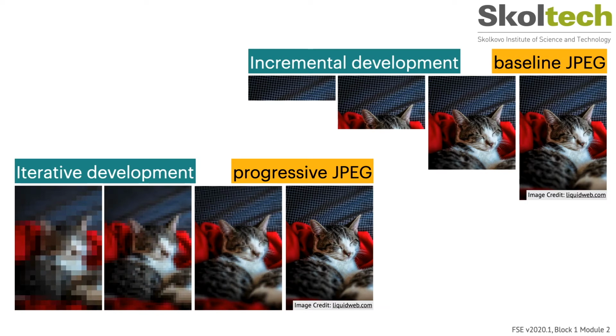For iterative development, we provide all features but at a low but usable completeness. Therefore, at any moment, our product is 100% ready, although the level of completeness may be like 4%. So depending on the available time, the project can be worked out to the pixel, or it can be left at the stage of some conceptual sketching. That gives you some flexibility in where you're going.